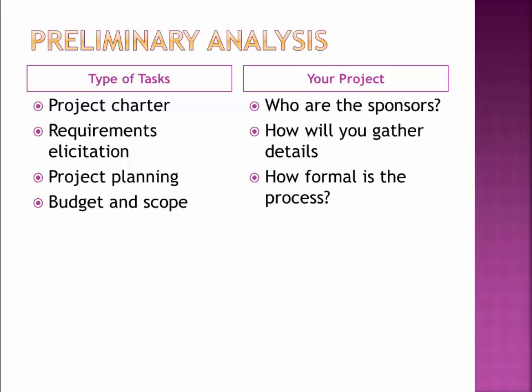So the types of things you might see at the preliminary analysis phase is a charter defining what the project's going to be. You're going to go through all of your elicitation activities. How are you going to get that? Are you going to do JAD sessions? Are you going to have interviews? You're going to read some documents. It's the pre-planning stuff that's going to go on inside of here, as well as the project pre-planning stuff. So who's going to build schedules? When are they going to be due? What sort of process setups do we have? Some tailoring of the process, things that might come up along those lines, as well as initial budget and scoping